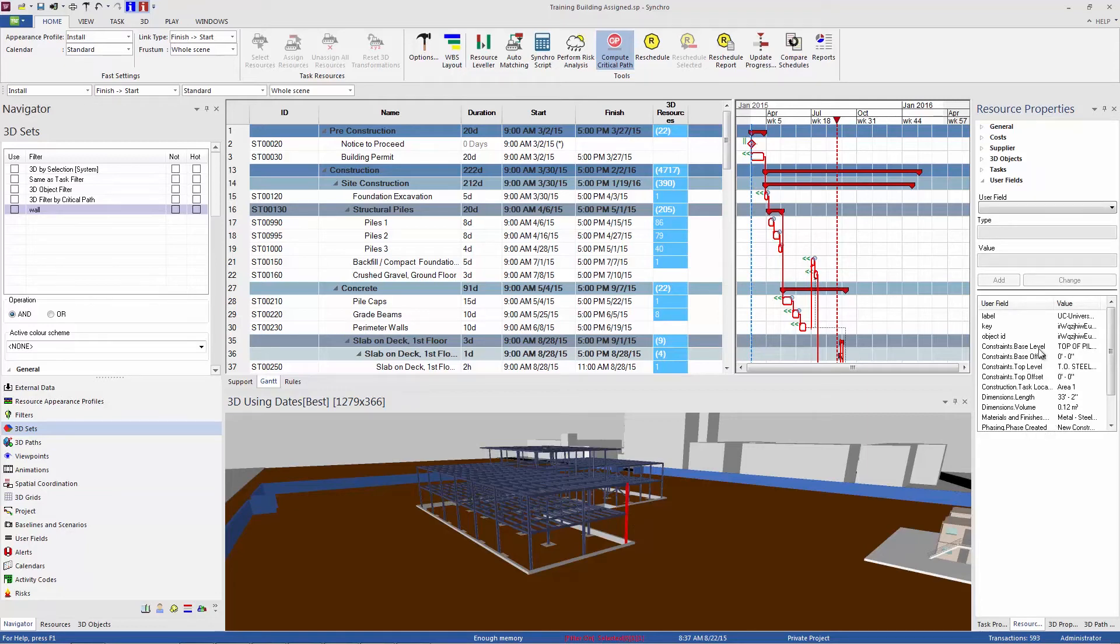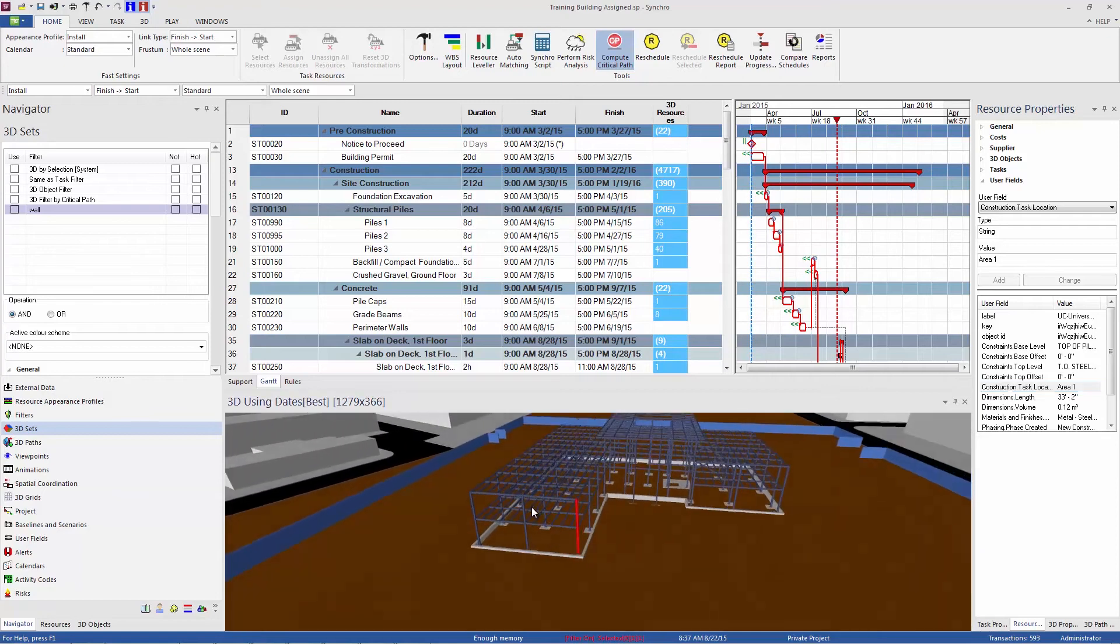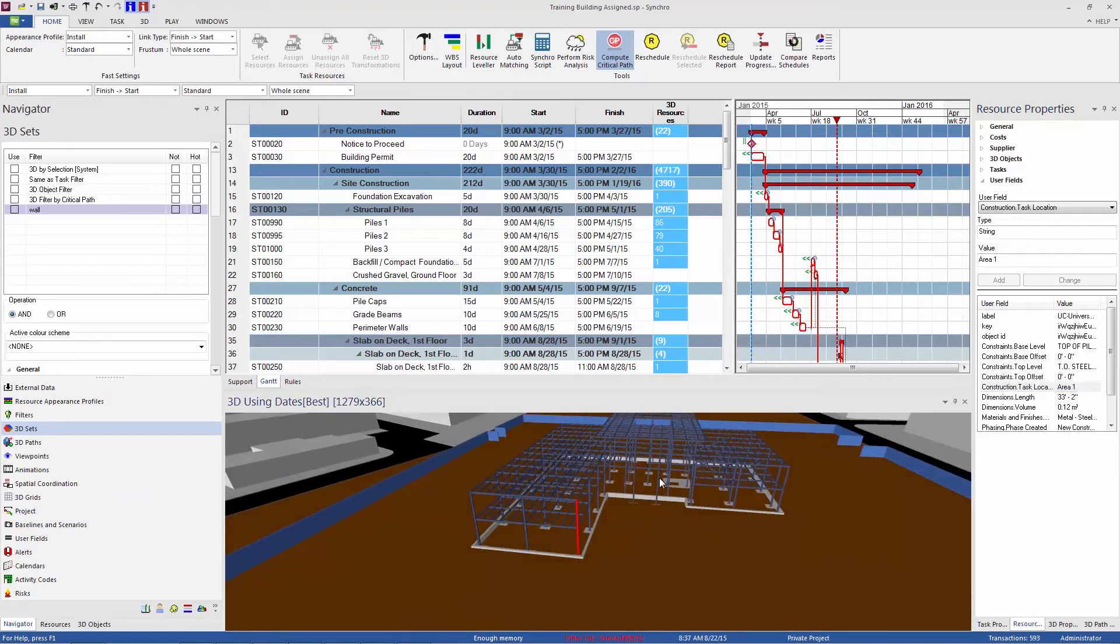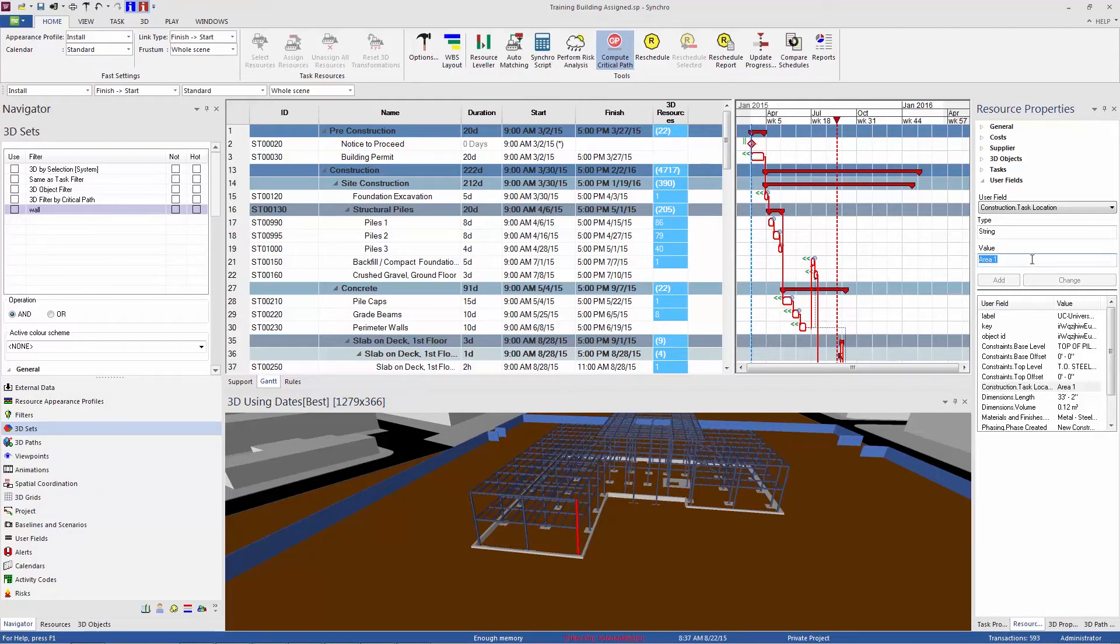And the user field that I want to look at is this construction task location. And the particular column I've selected is in area one. And all of these objects have been tagged with a particular area for where their task is going to occur. So if I wanted to filter out all of the pieces that are in area one, I could create a 3D set for that. So I'm going to copy this value here. And we'll use that again in a second.